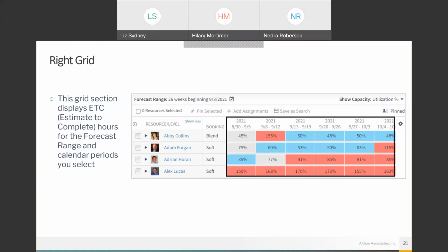An alternative to entering planned hours period by period is to enter the sum of hours for a range of dates and let Vantagepoint allocate those hours across the periods. Then you can make any necessary changes to fine-tune your plan. Any changes made in Resource View or Project View will also update the project plan.